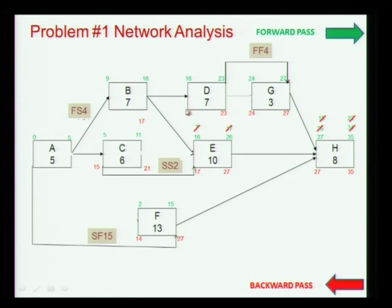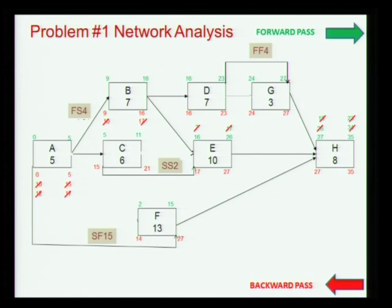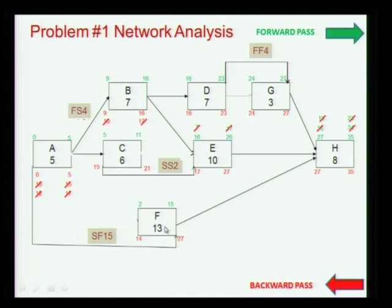Here we have two options: we had 16 and 17, so we take the minimum — 16 and 10 or 17 and 9, giving 16 and 10. Coming down to three paths, we have 0, 0, and 5, so it is 0 and 5. What this means is that 15 days after A starts, only F can finish. This is just a logical relationship — this is not a common situation; we are only doing it for the logic in the network.